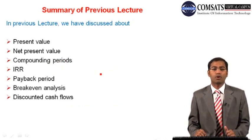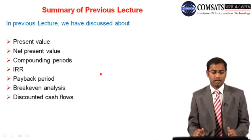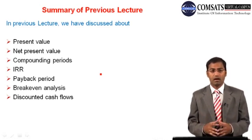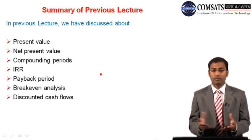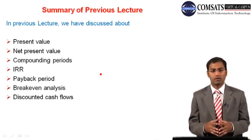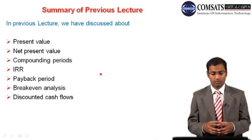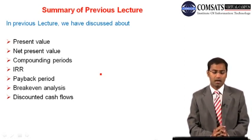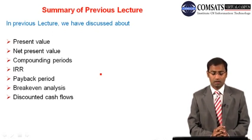The other day we were talking about some economic concepts. We discussed the present value concept and net present value. If we have a negative value, the project is not viable; if positive, the project is viable; if zero net present value, the project is indifferent to its objectives and goals. We also talked about the interest rate and the concept of compounding periods, and did a few examples on how compounding periods make a difference.